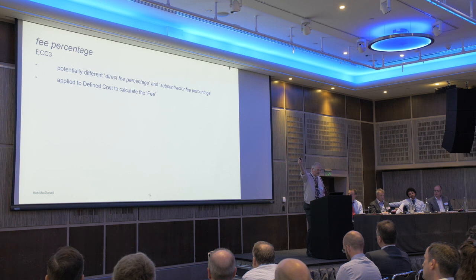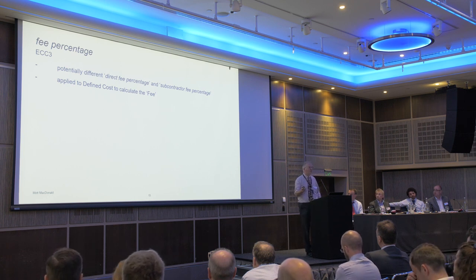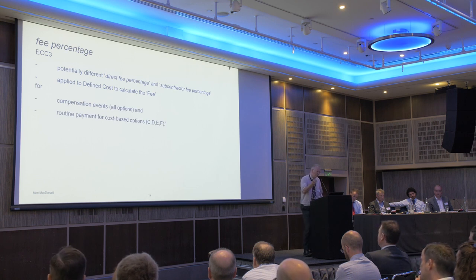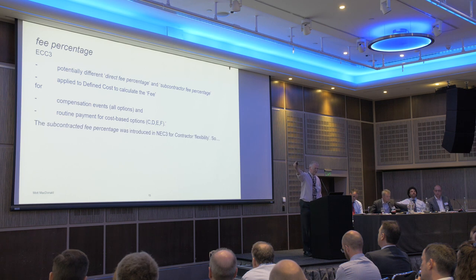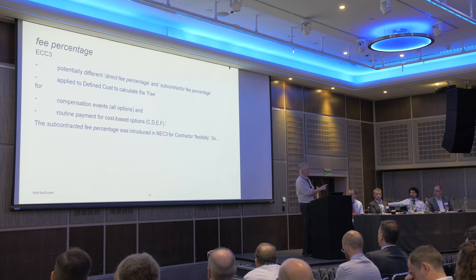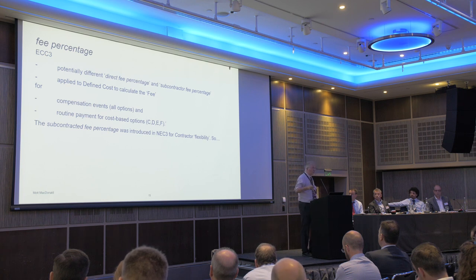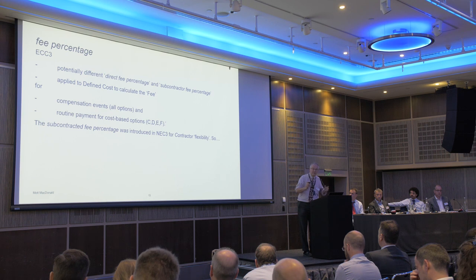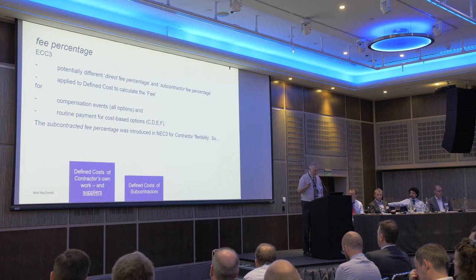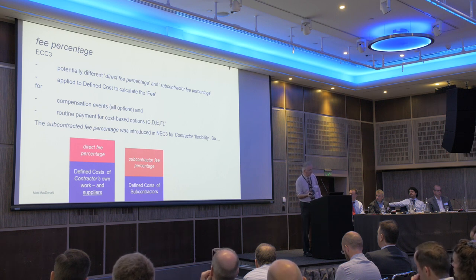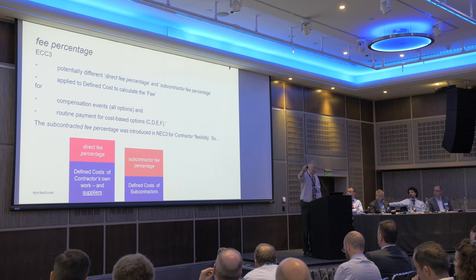In NEC3, it matters whether an entity is a subcontractor or just a supplier because there are two different fee percentages. For ECC3, we use defined cost for all compensation events across all options, and for cost-based options. I was told that when going from NEC2 to NEC3, subcontractors asked for two separate fee percentages — they wanted more flexibility in giving different fee percentages for different types of work. So ECC3 applies two different fee percentages on top of different types of defined cost, whether it's subcontractors or not.